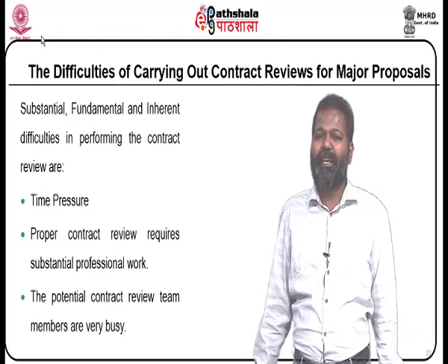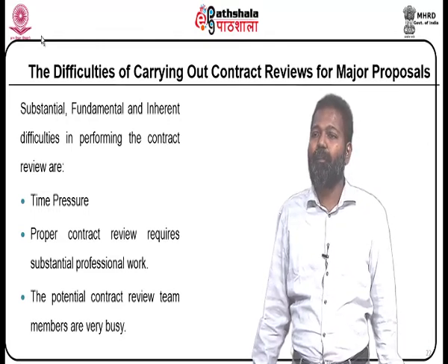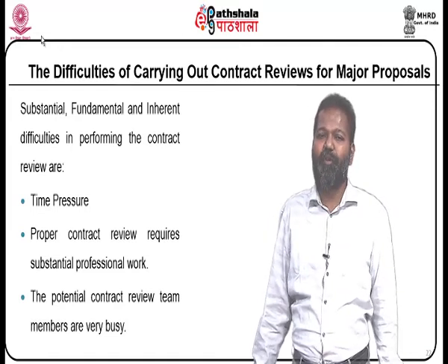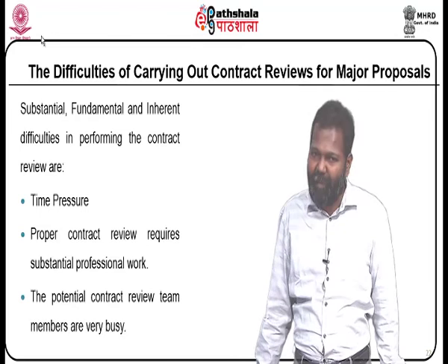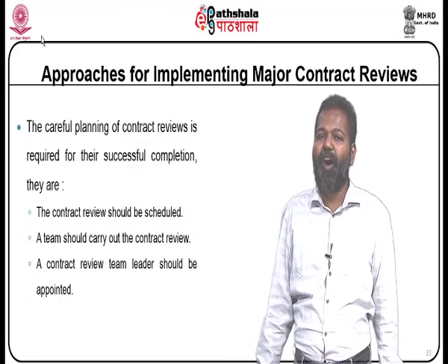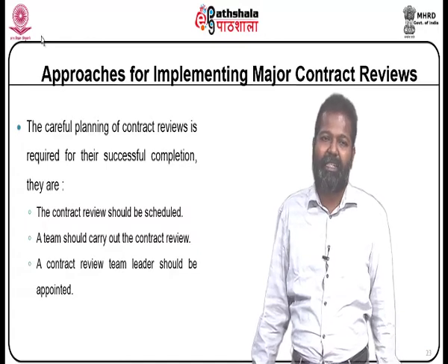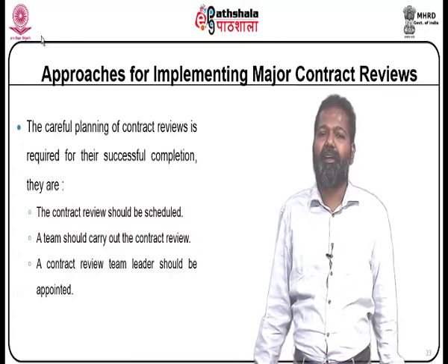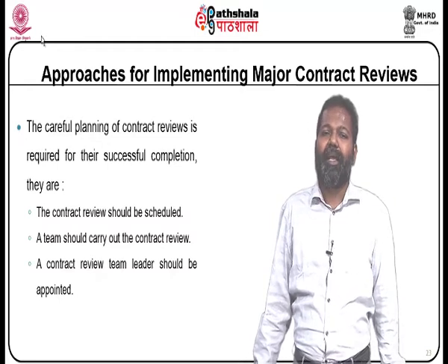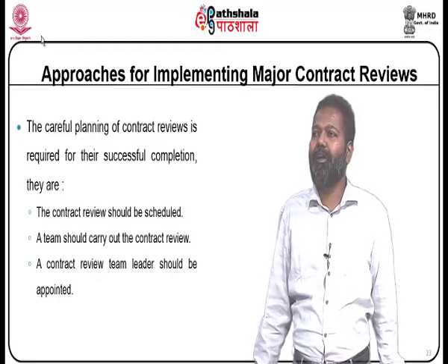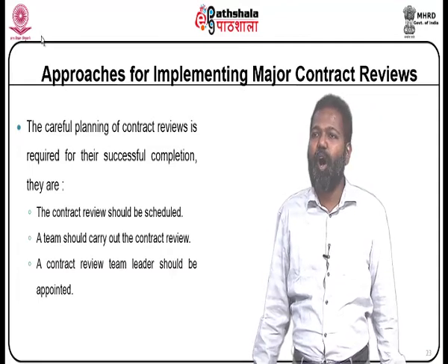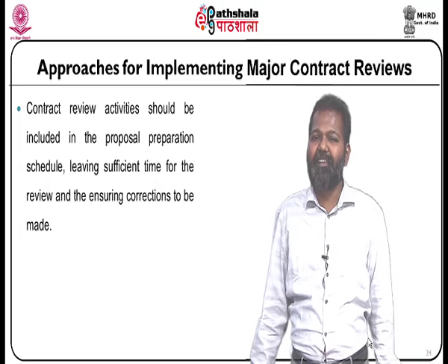Proper contract review requires substantial professional work. The potential contract review team members are very busy. Careful planning of contract reviews is required for their successful completion. They are: the contract review should be scheduled, a team should carry out the contract review, and a contract review team leader should be appointed. The contract review should be scheduled.